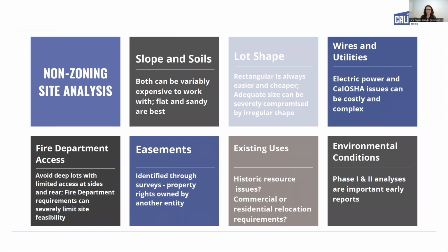Does the building that's there have any kind of historic resource component, or could it be considered historic? That is generally a red flag because it is very expensive and intensive to figure out how to develop on a site that has a historic resource.